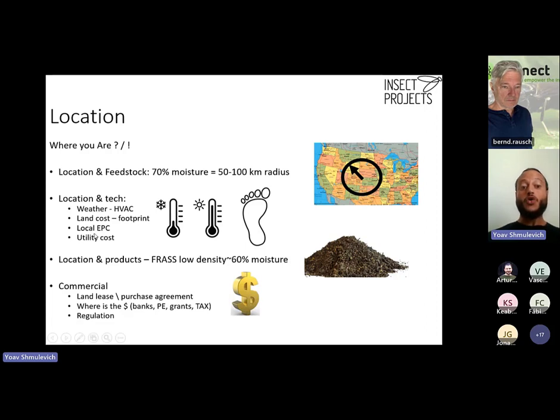And your local EPC, another very strong connection between your location and your technology. EPC stands for engineering, procurement, and construction. So you can get help from international companies, but eventually someone will have to do the engineering for your specific location, someone who knows the local standards and regulation. The procurement: someone locally will have to receive all the equipment that you get. And construction, of course, someone on the ground will have to put everything together, install it, and commission it.